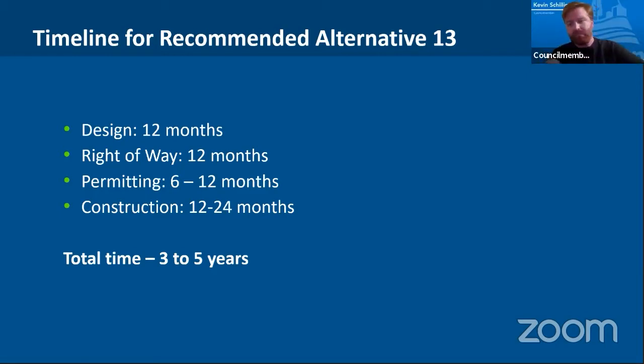I'm sorry about that, but I want you to know that I share in your concerns and frustrations, but I also come to this with a lot of experience in trying to do these kind of projects. And I work with a lot of peers in other cities who do these kind of projects, and purchasing 40 pieces of property is difficult. Your community members have rights, and we have to follow the process for getting those. And you just mentioned federal money. Federal money will stretch this out. Their rights are much more significant when we start using federal money. And to get 40 pieces of right-of-way, and I'm not saying this because I don't want the project to go fast too. I understand what you're saying, and I feel your pain, and I felt it over the years in doing these kinds of projects. I am saying this because honestly, 12 months for 40 parcels, it really will depend on whether those people are willing or not.